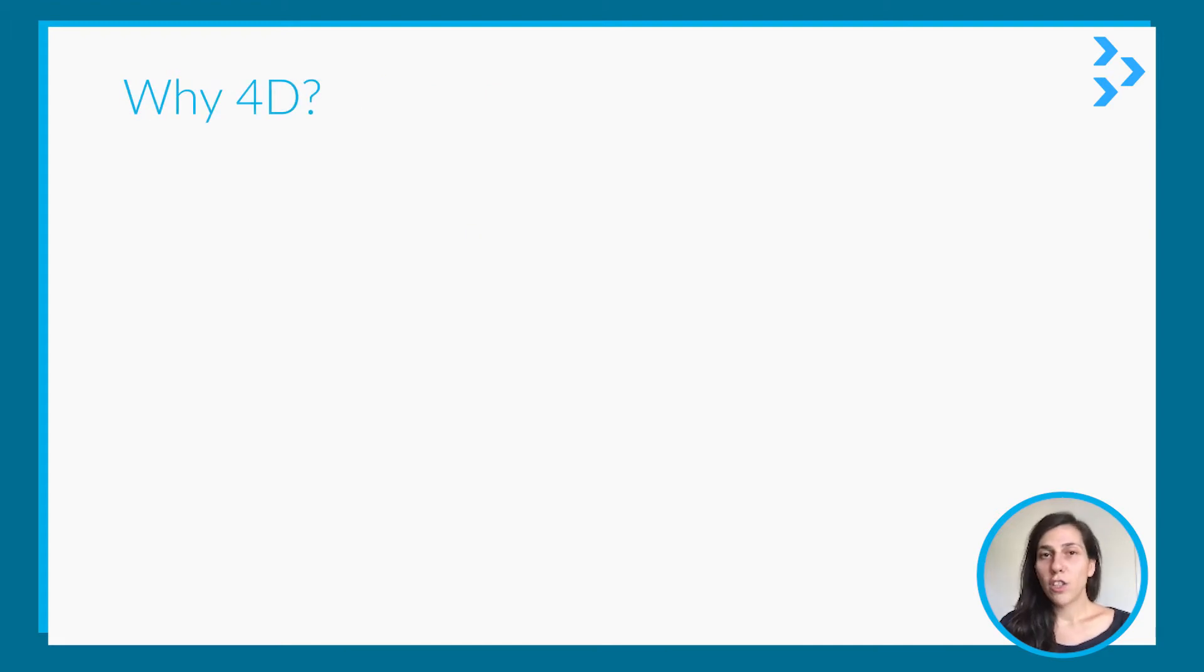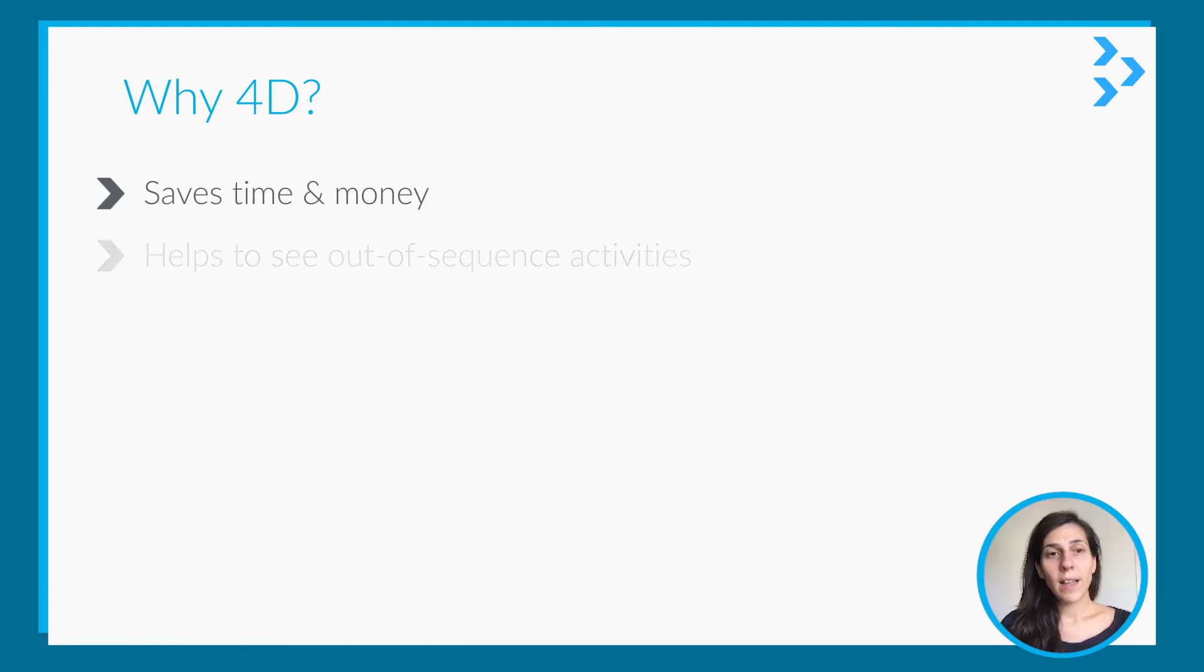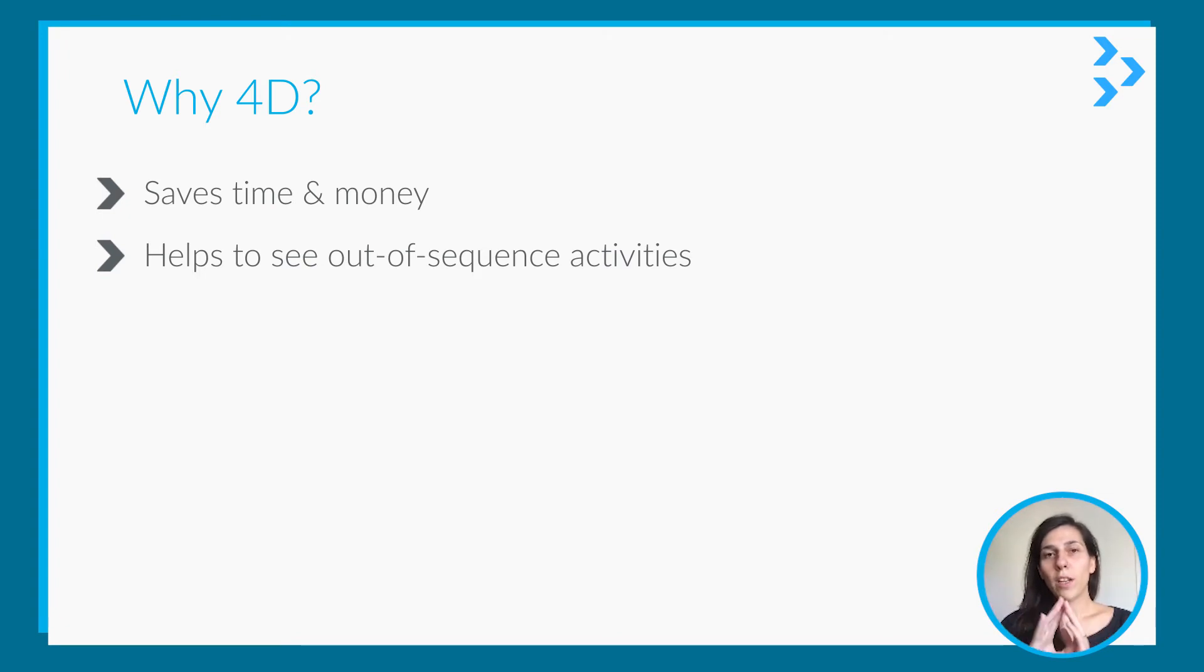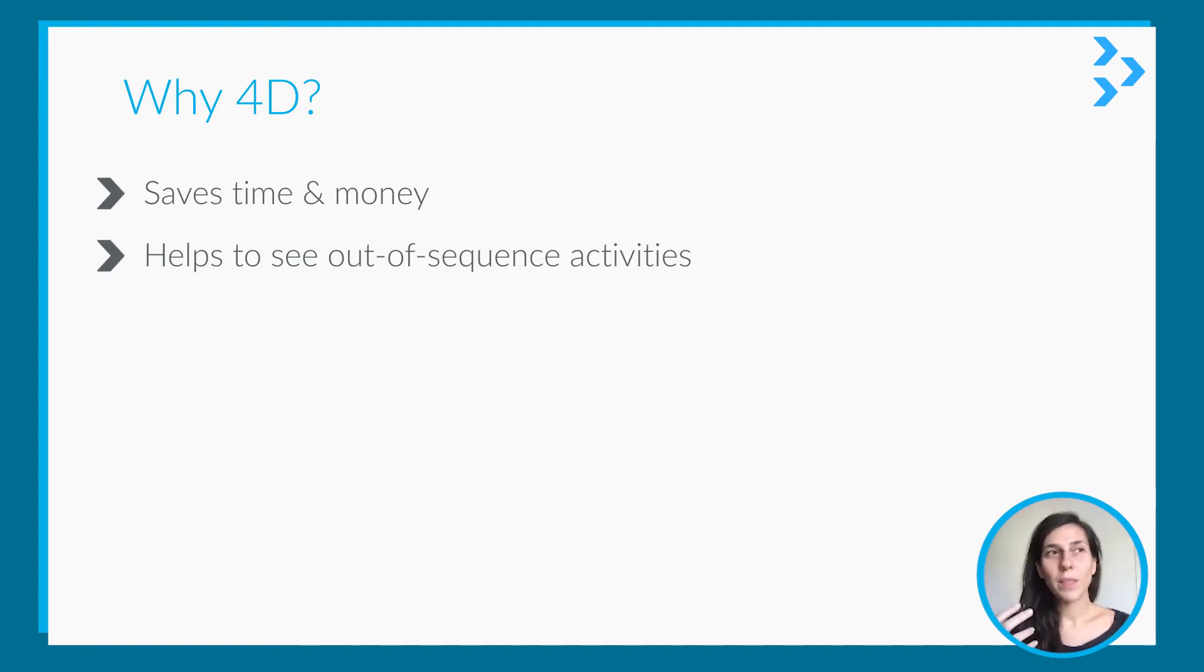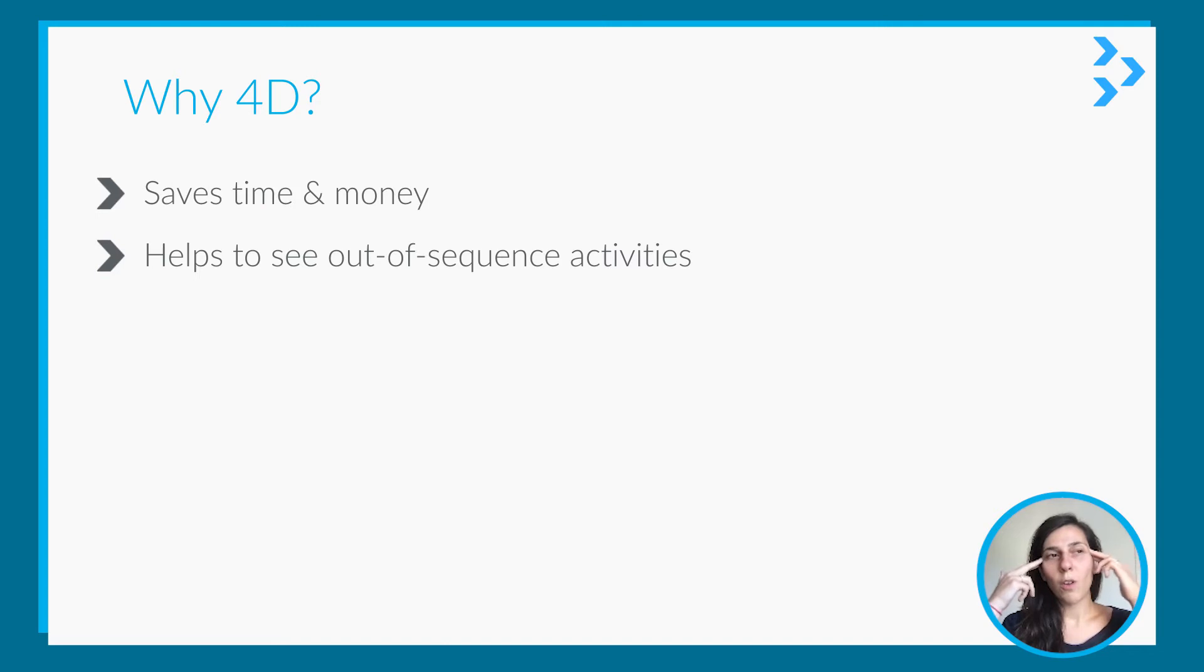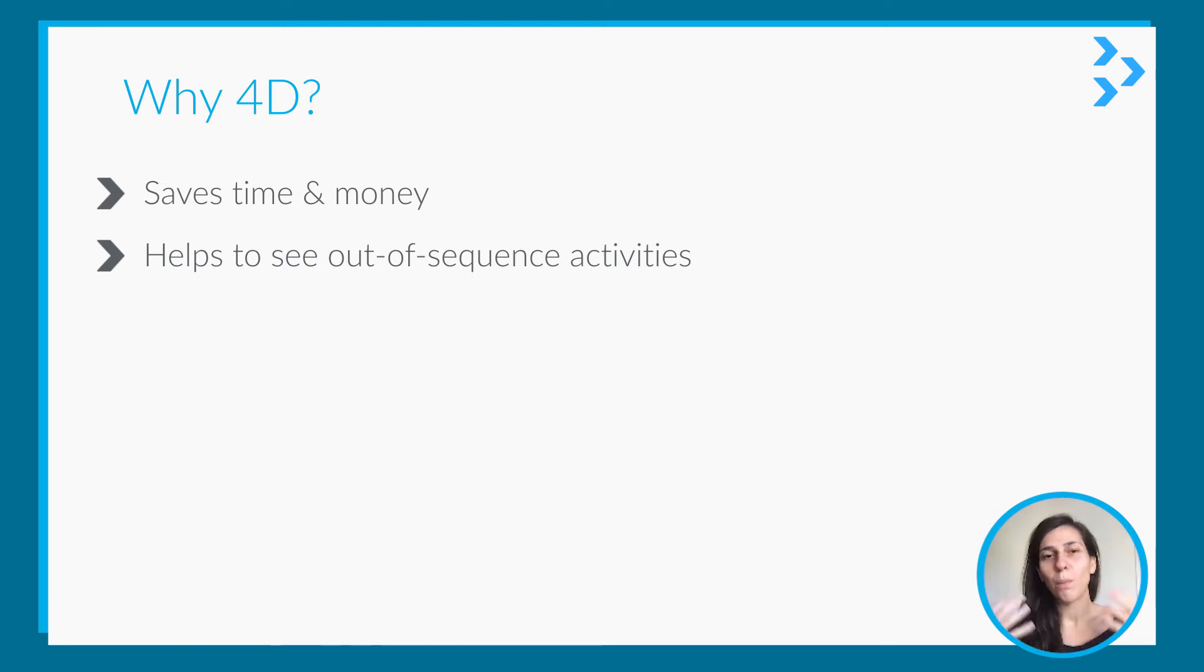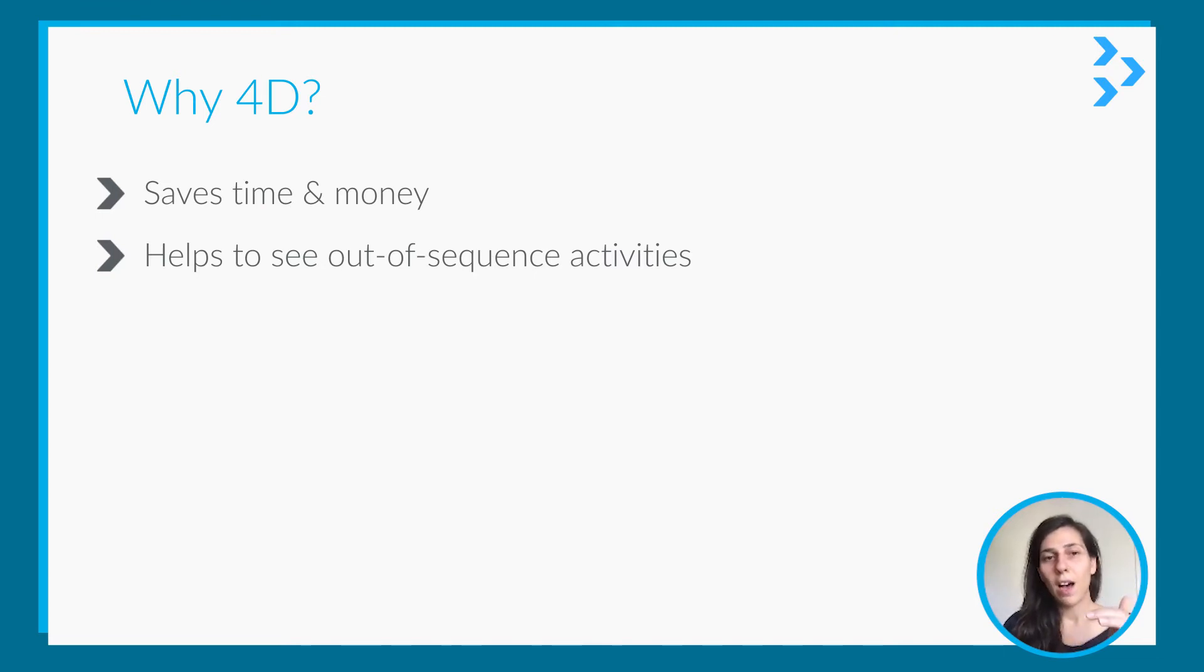So why should we use 4D? It saves time and money. It helps to see out-of-sequence activities. This is actually one of my favorites because in the program where you're just creating the program, you can put your links, etc. But sometimes it's hard to visualize it in your mind. Maybe you have a wrong link between the activities, but it's hard to see it without merging it with the 3D model. So 4D really helps you with those out-of-sequence activities.